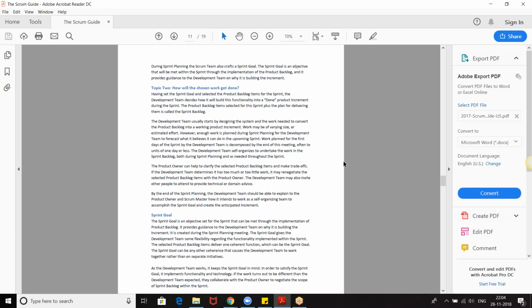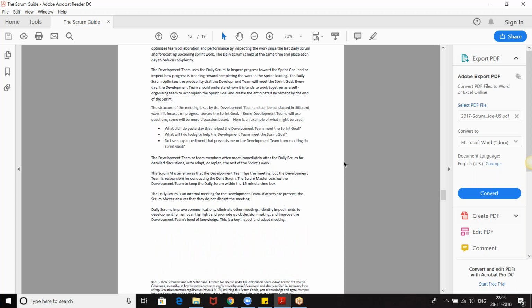So in a situation like that, the sprint goal becomes obsolete. They would want to come up with new innovative ideas, experiment and come up with something new, and then proceed to introduce that feature and move it to production. Only when the sprint goal becomes obsolete does the sprint usually get canceled. Otherwise the sprint usually will not get canceled. Like if some competitor has released it ahead of time, then the sprint goal will become obsolete.